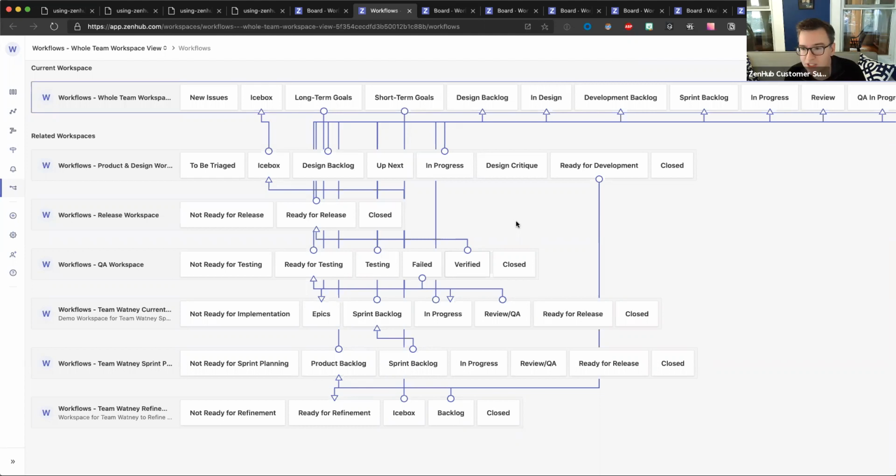It allows you to focus in on sprint planning and just see the stuff that's ready to go into a sprint plan. And then during the sprint, being able to park all those issues that are not ready for the team to look at for the current sprint, into that not-ready-for-implementation column is like magic, right? Because it really hyper-focuses the team.